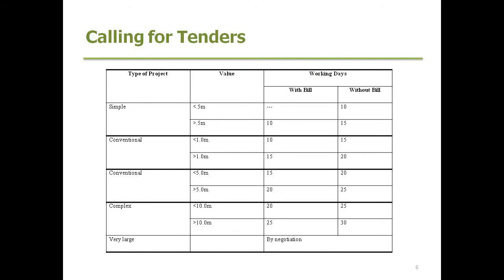As I mentioned earlier, the duration of calling the tenders will vary, and this simple matrix here demonstrates that from a simple project up to a very, very large project. So it's something to be aware of, the length of time that tenders need to be open, need to be out there. So looking at the size, complexity, the level of the documentation, as I said earlier, site visits, and in some cases presentations need to be considered by the contractor or the builder.